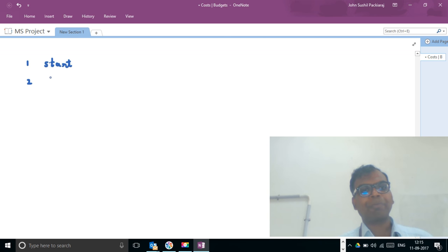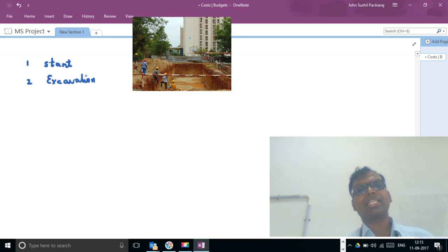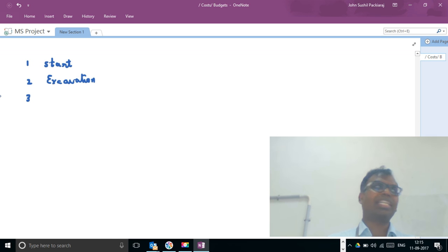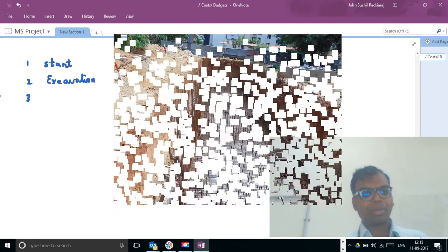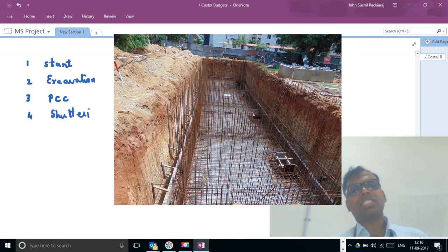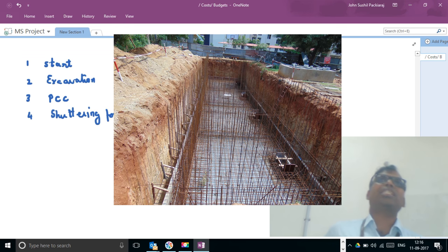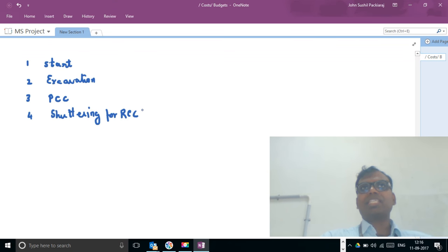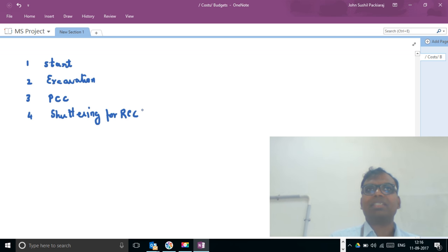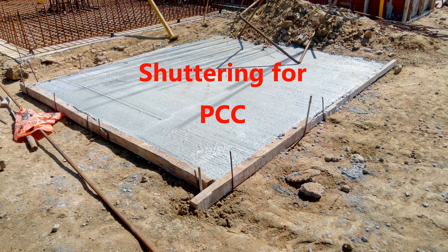As usual, we are going to identify the tasks: we are going to have excavation — we need to dig a pit. Then we need to do slope protection work if required. Let's assume we don't need slope protection in this case. The next things are PCC and shuttering. For PCC, you make an excavation for a foundation slightly bigger than the actual foundation depending on the working space required. Typically you don't do shuttering for PCC, but if you go to the new architecture block you will see shuttering being done for PCC also — it is a case-to-case basis.